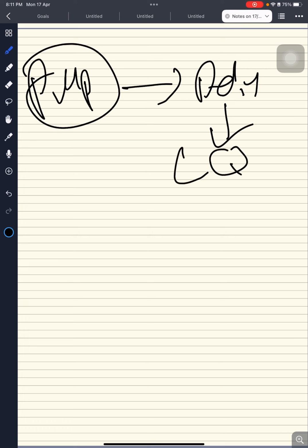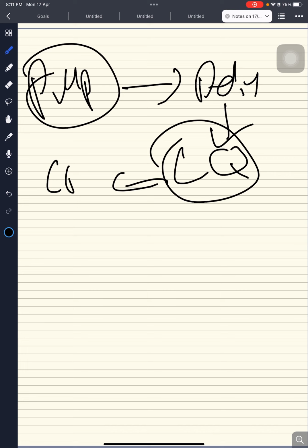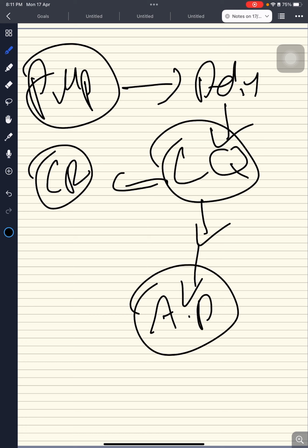In control quality, we will check whether the deliverables are right or not. If not, we raise a change request. In the predictive approach, the change request goes to the change control board. In agile, the change request goes directly to the product backlog. Then the client checks and validates the scope, whether it meets the requirements or not. If it does, we get the accepted deliverable, and then we go to the closing of the project.